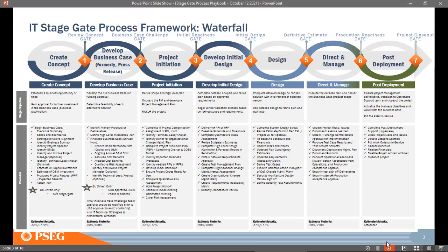So in create concept, you start the business case document. You start entering the data into it, and have multiple discussions with your line of business and with the technical teams that you feel need to provide inputs into the project. Then once you have the business case document started, start reviewing the document with appropriate peers. It could be the EPMO team, your lines of business team, or the security team. You have to start discussing with them.